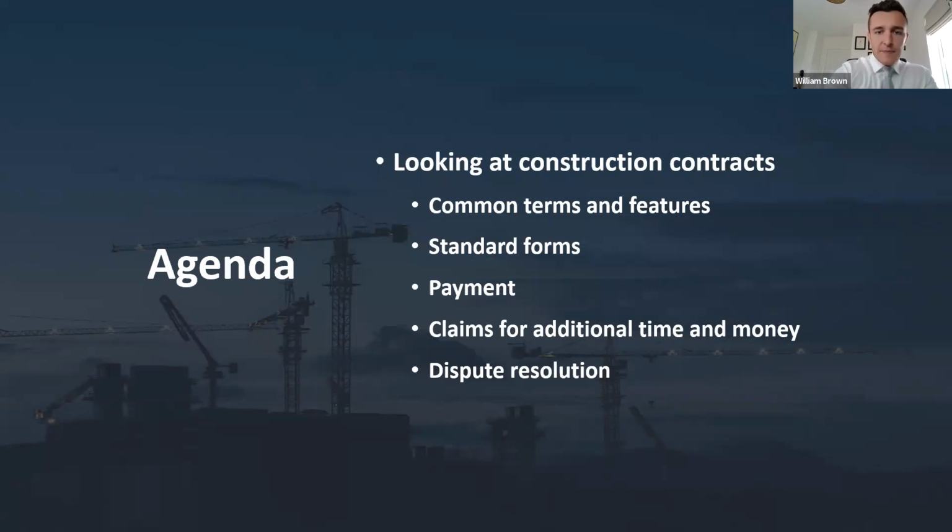Payment is an interesting one. It's interesting because payment in the construction industry, both in the UK and in Ireland more recently, is heavily regulated by statute. So if you're working in the UK, England, Scotland, Wales, or Northern Ireland, it will be dealt with under the Housing Grants, Construction and Regeneration Act if you are in England, Wales, or Scotland, or if you're in Northern Ireland, a slightly different piece of law, but it does virtually the same thing, the Construction Contracts Northern Ireland Order.